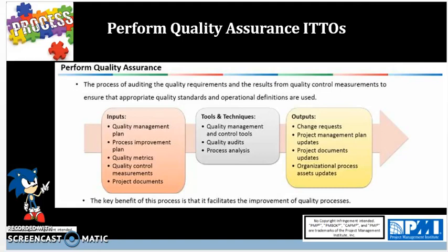and procedures. The objectives of a quality audit may include identifying all good and best practices being implemented, identifying any and all non-conformity, gaps, and shortcomings, sharing good practices introduced or implemented in similar projects in the organization and or industry, proactively offering assistance in a positive manner to improve the implementation of processes to help the team raise productivity, and highlighting contributions of each audit in the lessons learned repository of the organization.